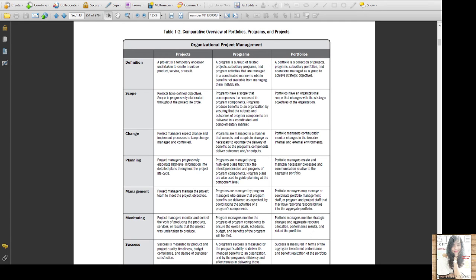Program management includes aligning with the organization's strategic direction that affects program and project goals and objectives; allocating the program scope to program components; managing interdependencies among the components of the program to best serve the program; managing program risks that may impact multiple projects in the program; resolving constraints and conflicts that affect multiple projects within the program; resolving issues between components, projects, and program level; managing change requests within a shared governance framework; allocating budgets across multiple projects within the program; and assuring benefits realization from the programs and component projects.